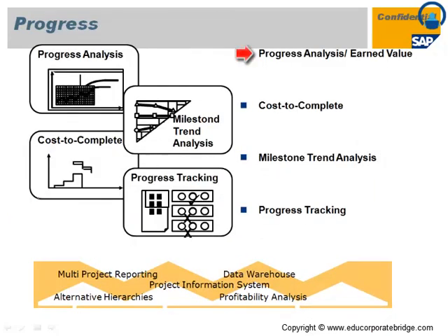This is the progress analysis or earned value analysis, where you can get the cost to complete, milestone trend analysis, and the progress tracking. So there are different methods provided by SAP, that is work-based, weight-based or cost-based, where you can track the progress of your particular project.